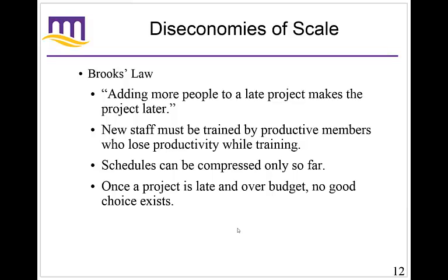So when people developed software for a small mainframe, it would also be able to work on a large mainframe. The idea is they wanted to develop pieces of software that would work on all their different sizes of mainframes, which is something new they hadn't done before. And so Brooks was in charge, I believe, of developing this operating system. They had developed a timeline for when this was going to be done, and they started working on it. But they started having problems, and so they were told, well, hire more people, get this project done on time.